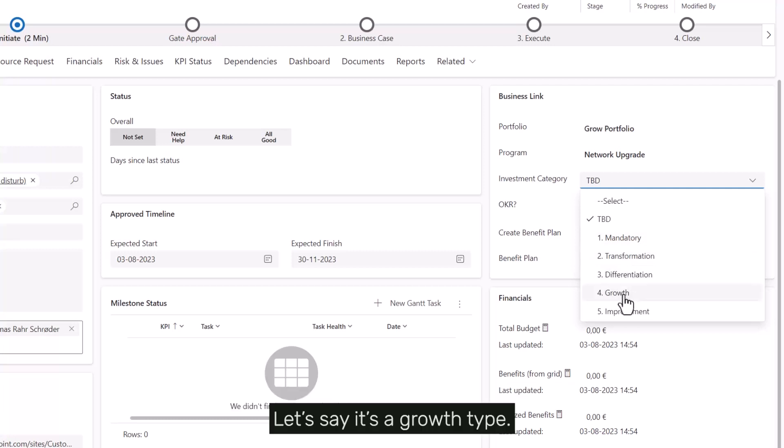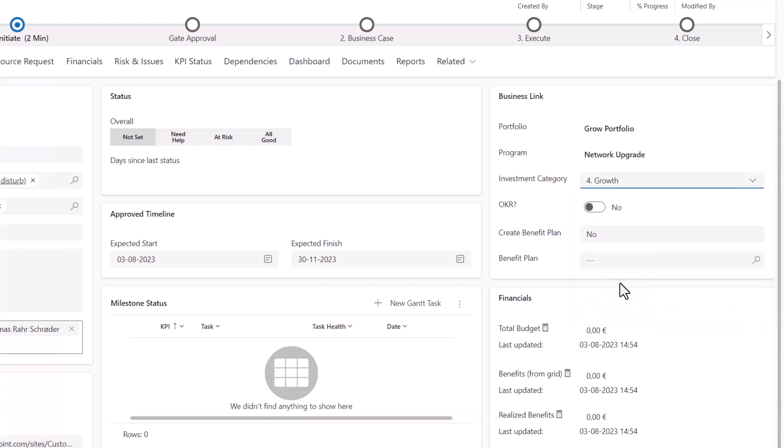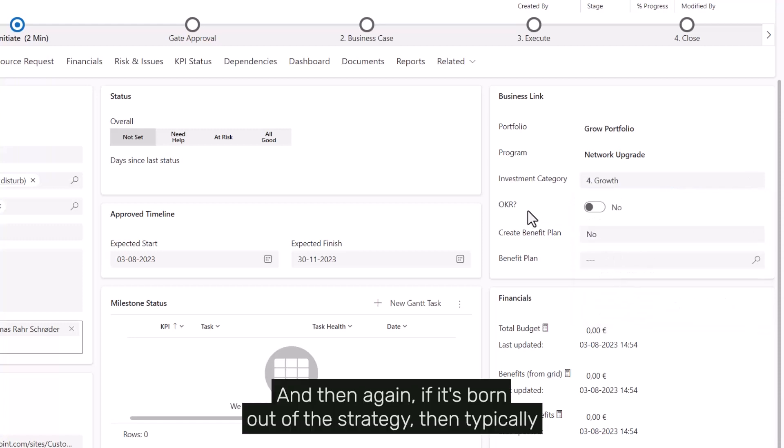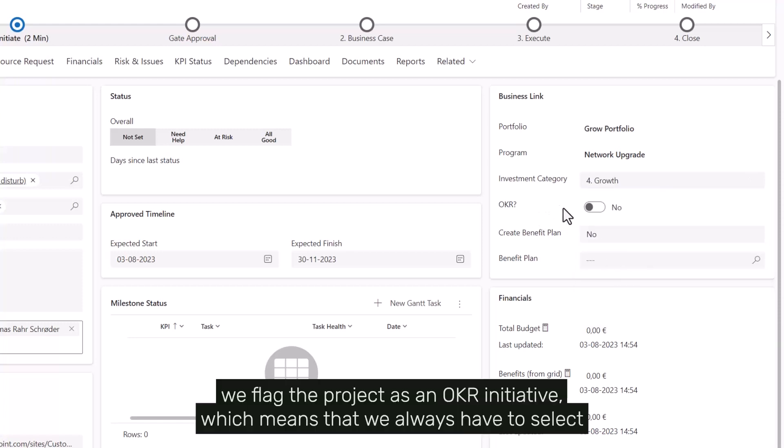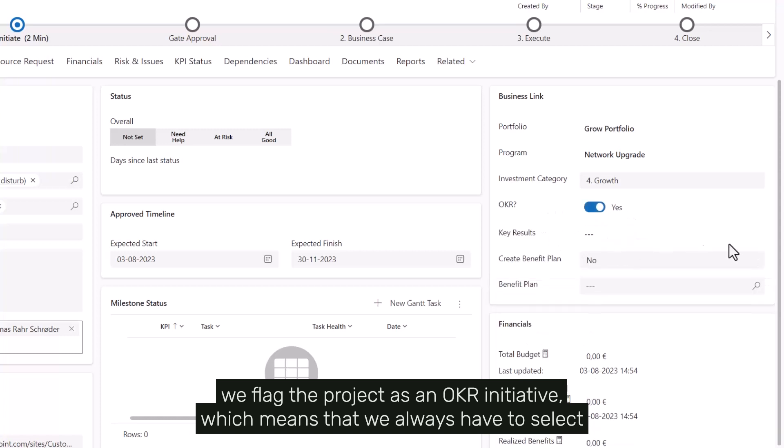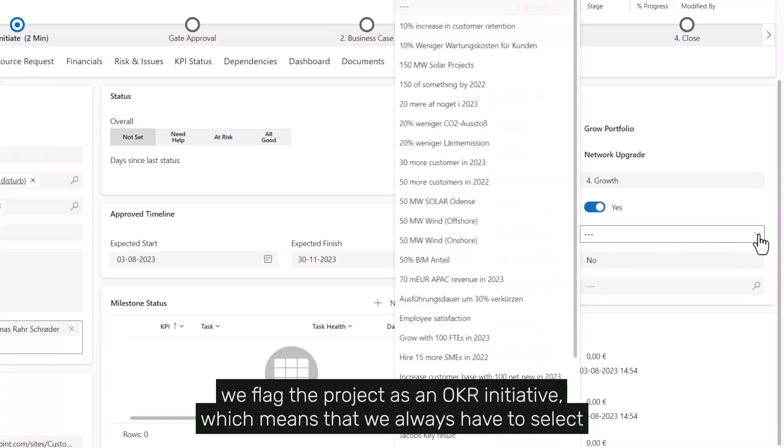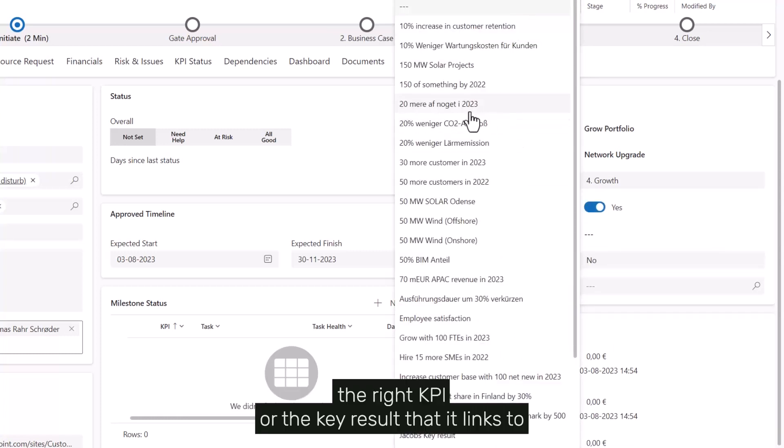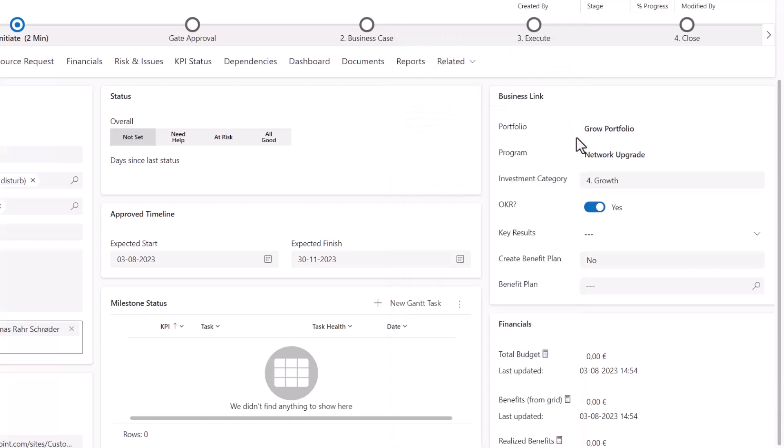And then again, if it's born out of the strategy, then typically we flag the project as an OKR initiative, which means that we always have to select the right KPI or the key result that it links to.